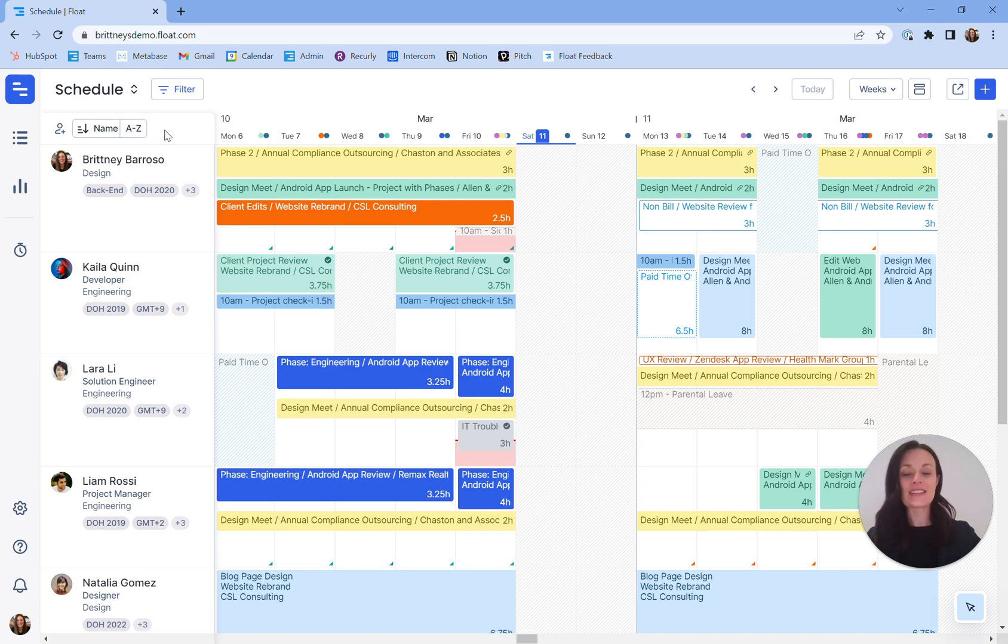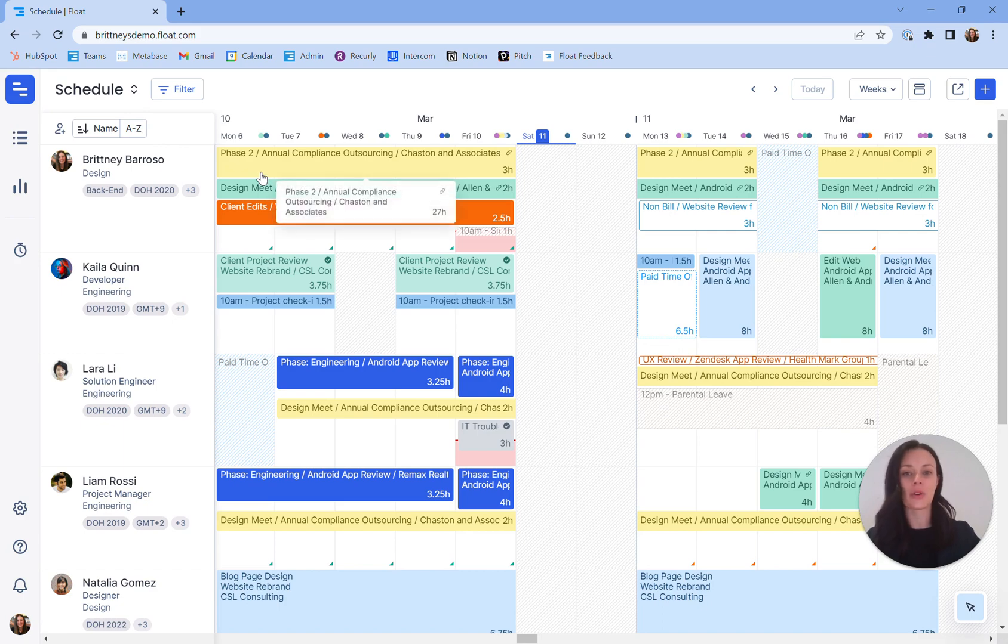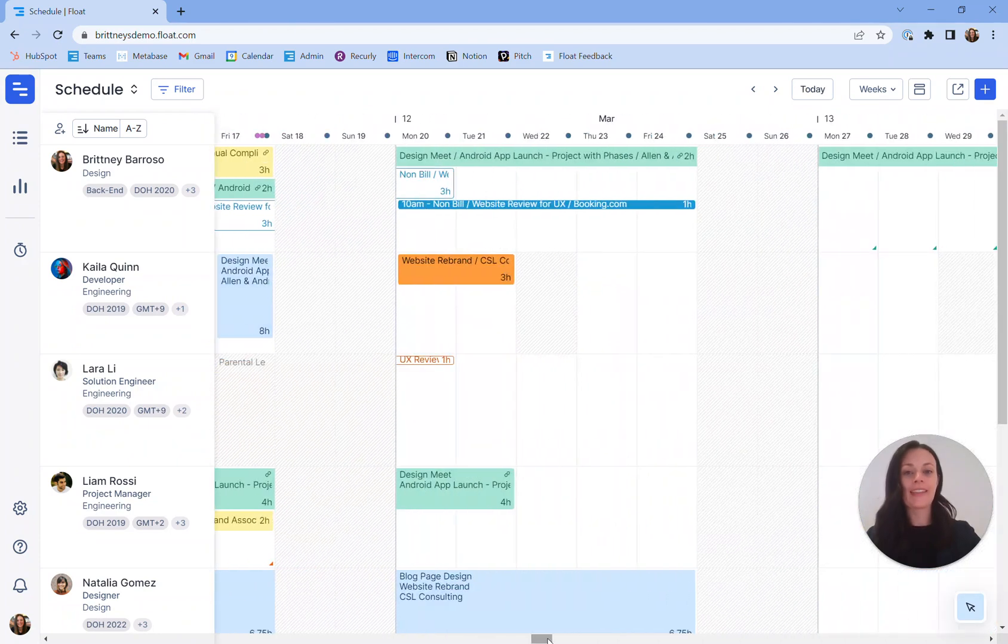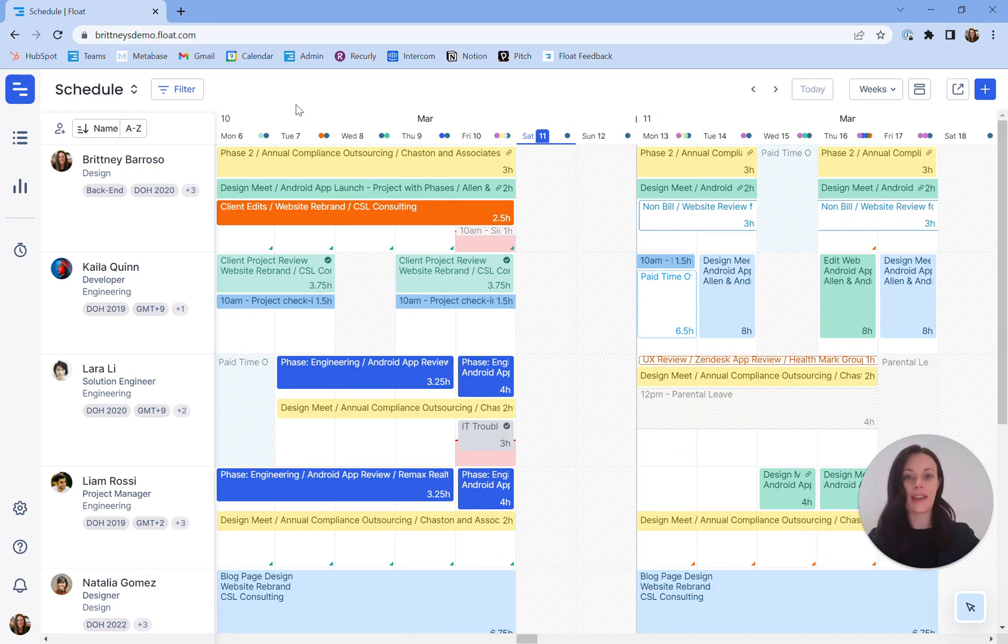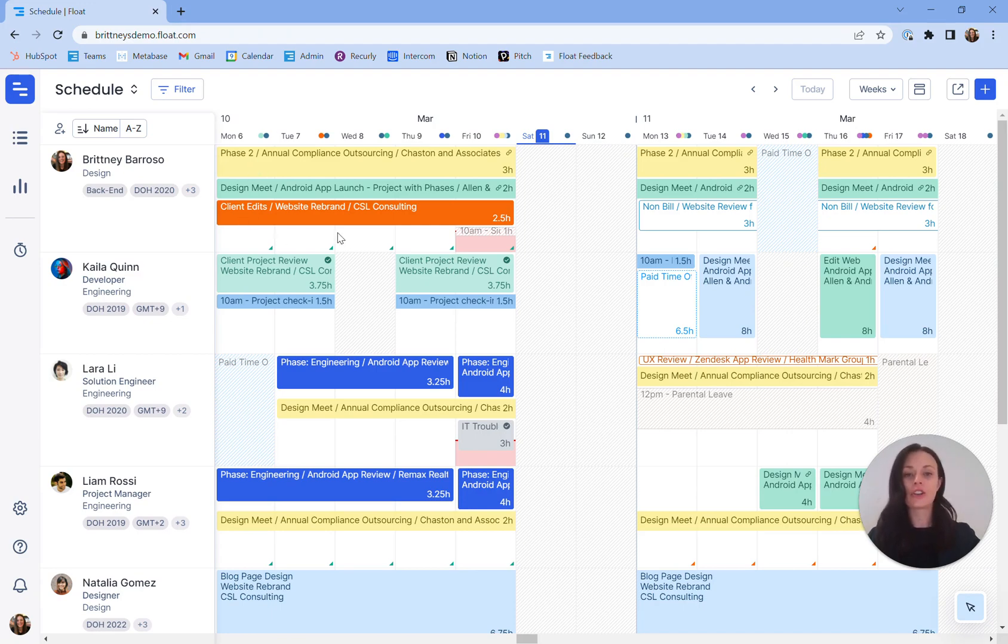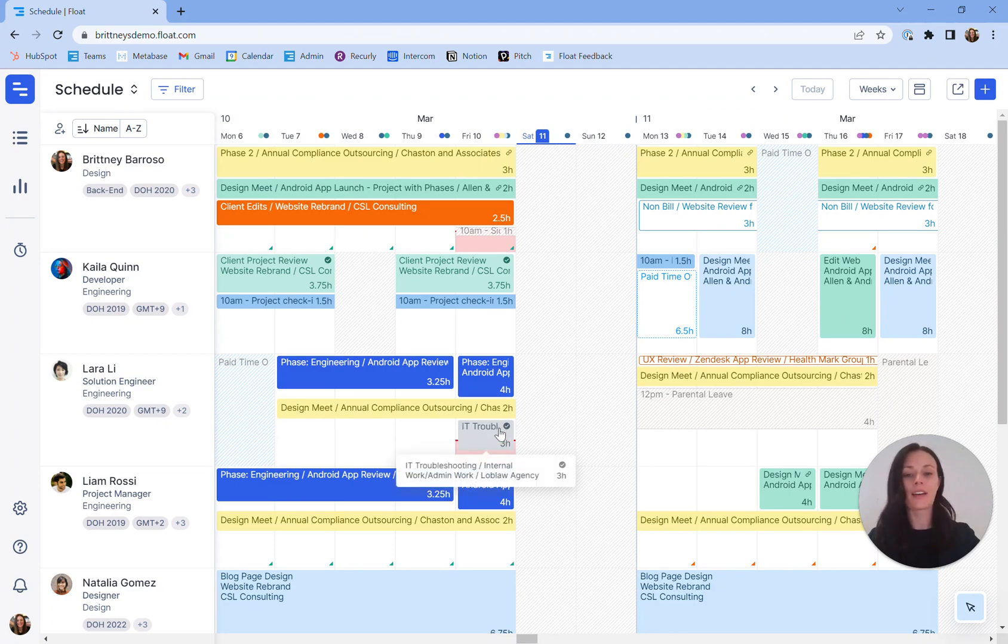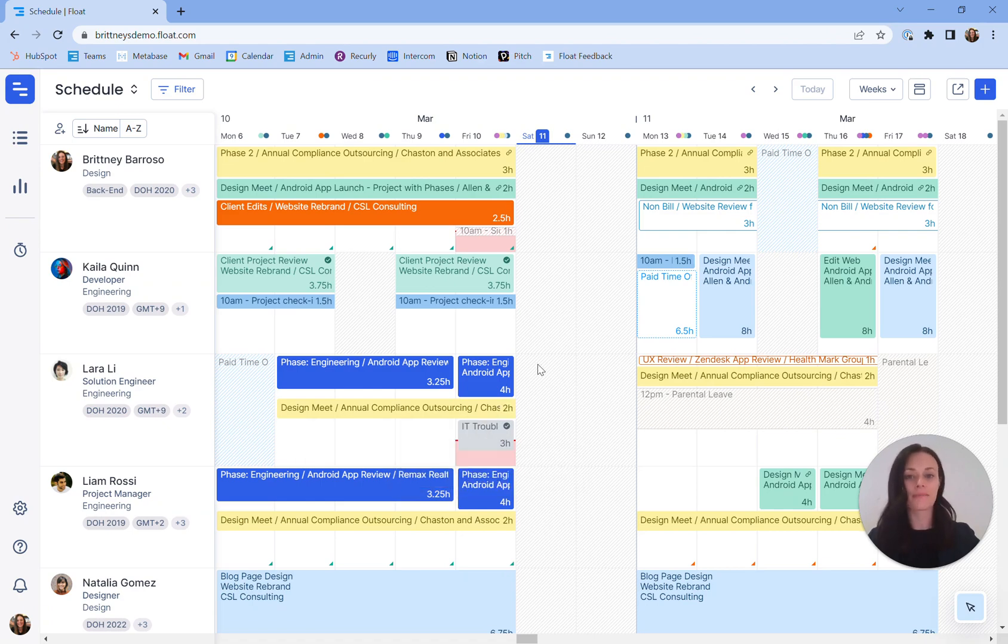You'll see a list of your team down the left-hand column. And to the right of each team member, you'll find their corresponding schedule. You can scan schedules in the future or past using the scroll bottom at the bottom, and then you can return to present day by selecting today. Let's talk about reading the schedule. You'll find all free space, time available to schedule work against, is represented within Float as white space. In that vein, you'll notice any red space indicates the work scheduled beyond a team member's standard capacity. In essence, this is overtime.